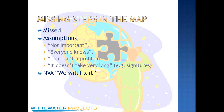But those things are important — what happens if your boss is on vacation and you needed that approval? You don't see it if you don't have a step for it in the system. Don't think something's not important; put everything down. It's easier to put it all out there and collapse things down than to have too few columns and try to build them back up once you've already started. Put too much down to begin with. Also, when you are first putting Kanban in, if you see something you can fix, don't try and fix it right now — put it down, write it down that it's there. That's the current state. Start where you are.